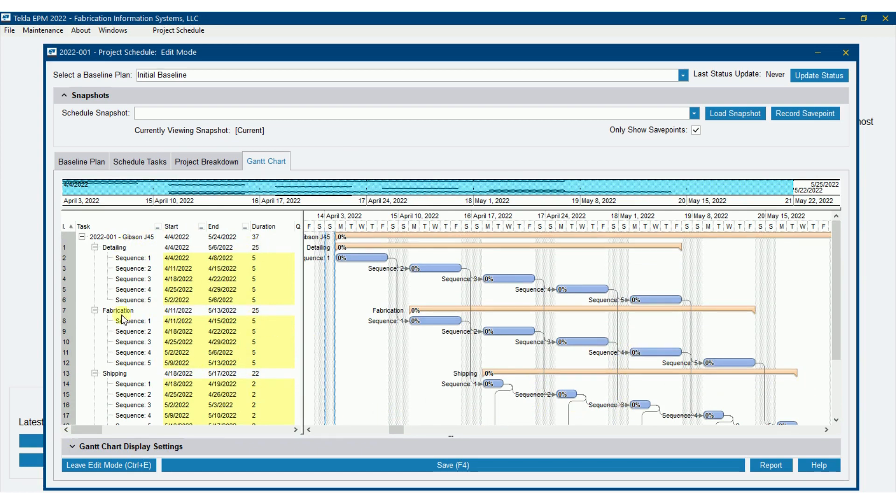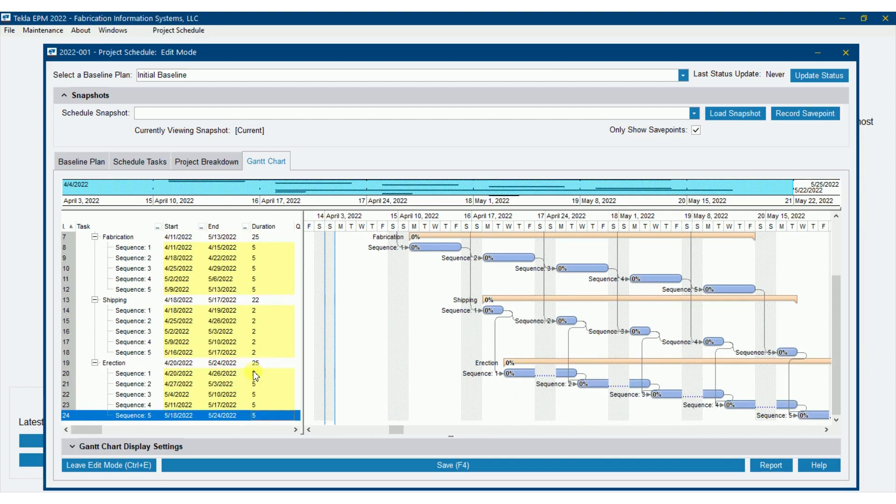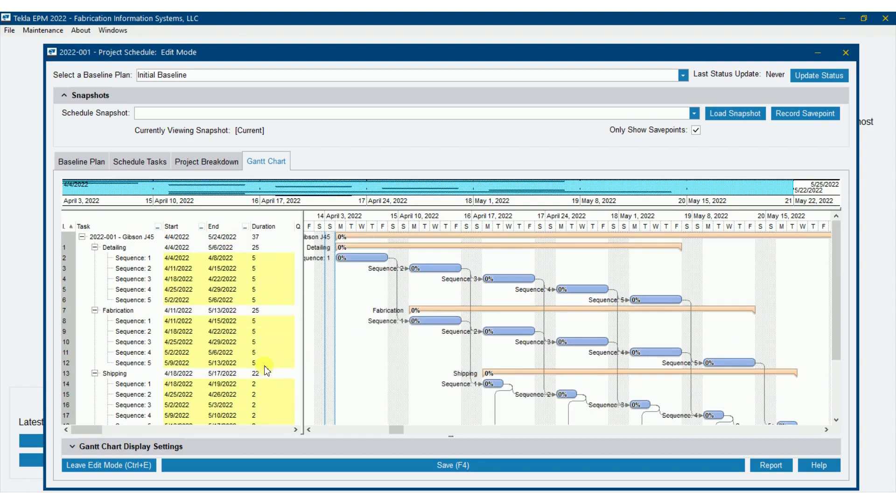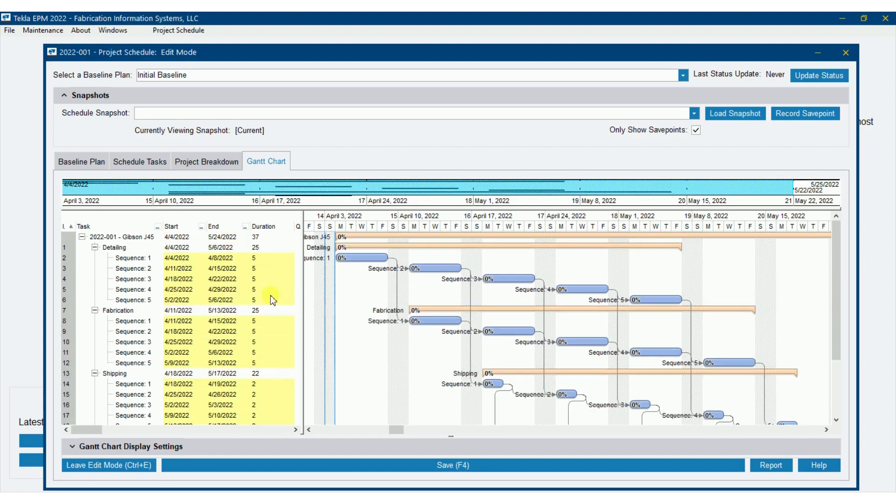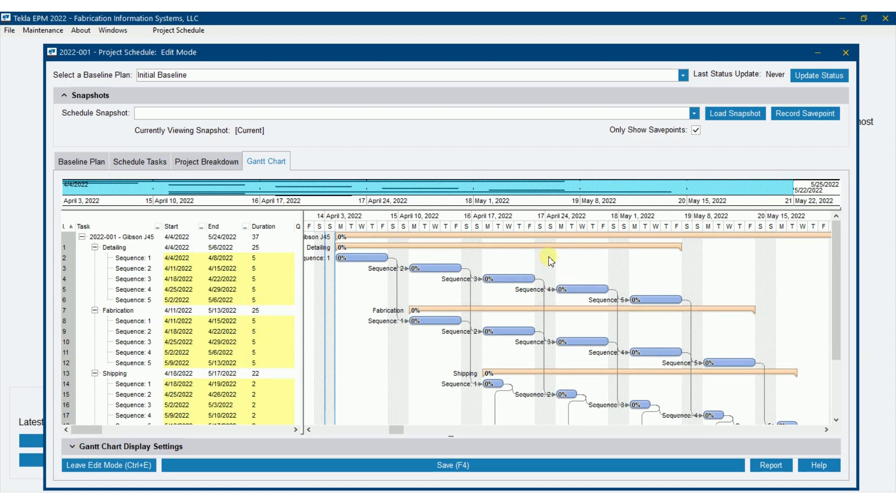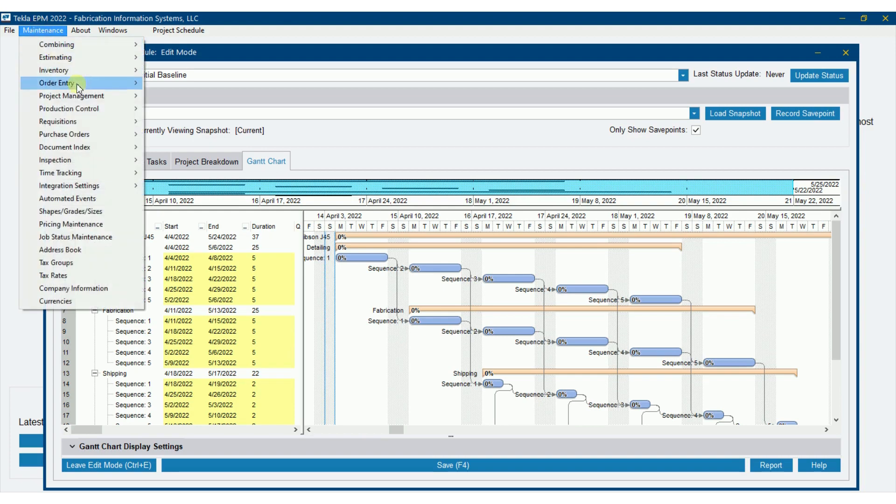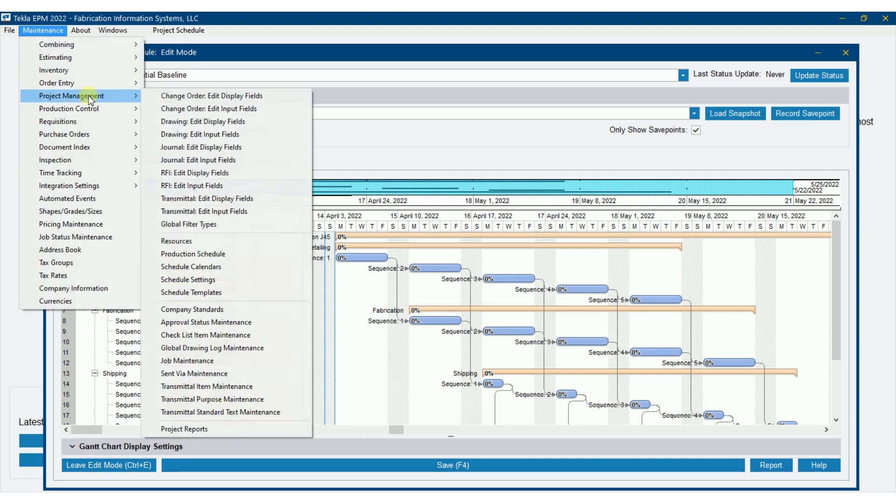So detail is going to take 25 days. Fabrication, 25. Shipping, 22. Erection, 25 days there. And that's all pushing out based off of the number of days. Let's talk about those days. How does it know that I'm working just Monday through Friday? Is that an assumption or is that a setting? Let's go look at some settings here.